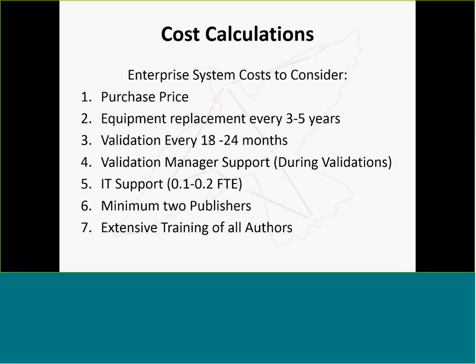Validation, you will need validation manager support, and you will also consistently need IT support. You can usually think 0.1 to 0.2 IT managers on an ongoing basis. So this means 4 to 8 hours of IT support a week. Now, publishing systems, you need a minimum of 2 publishers.